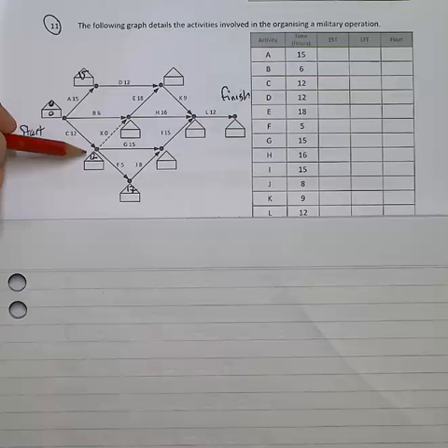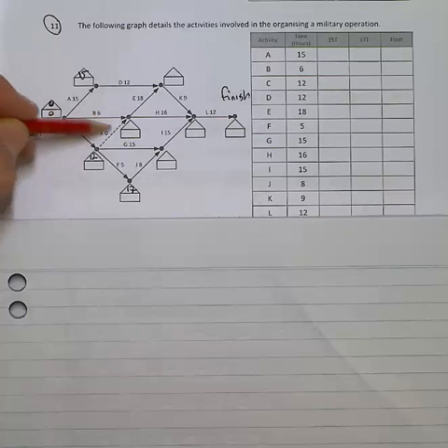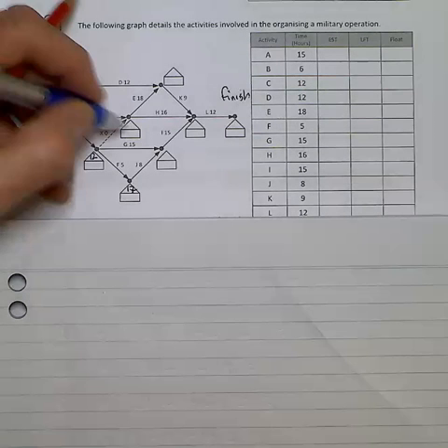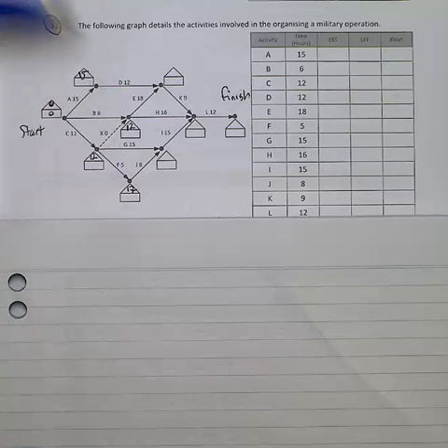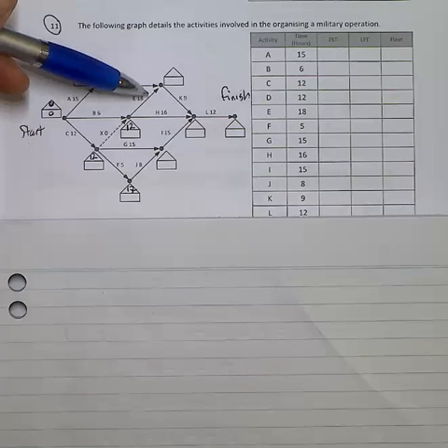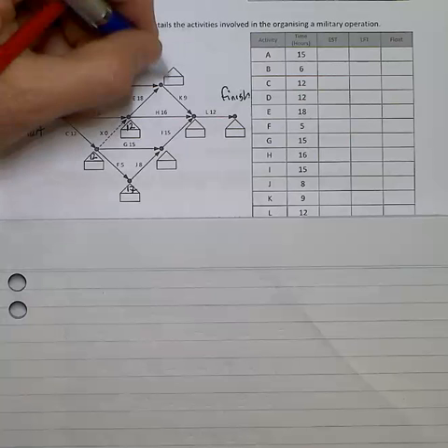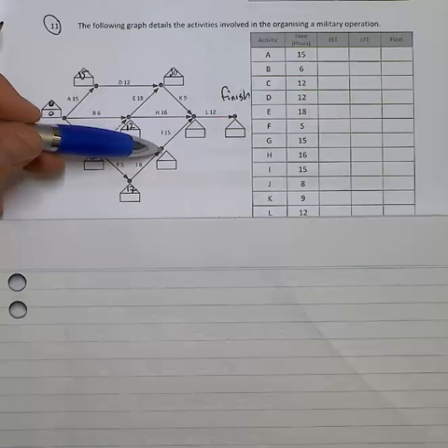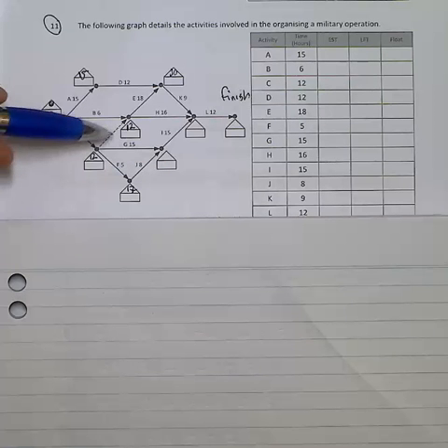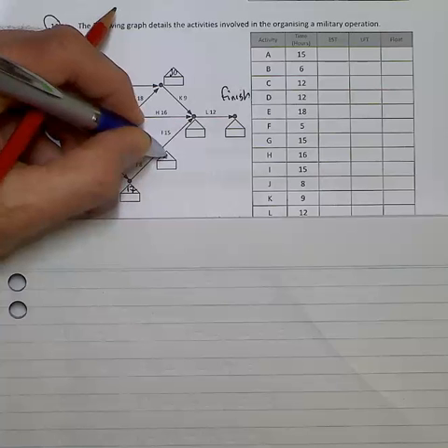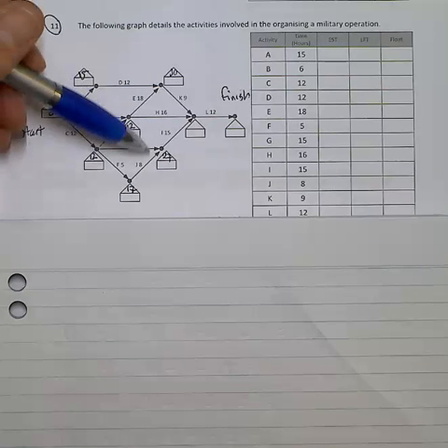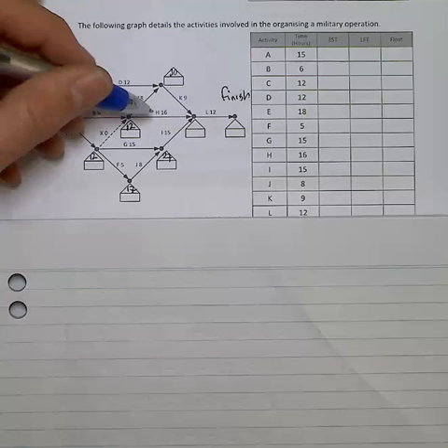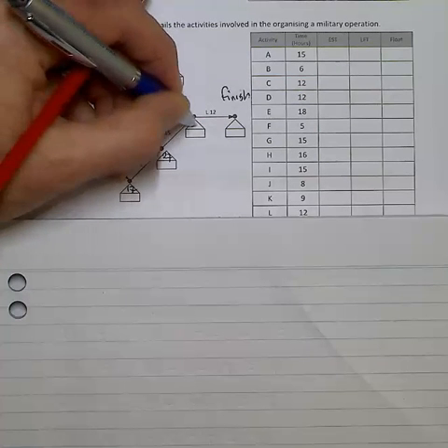Now please notice here we've got a dummy edge, and whilst that may not take any time, we've got to consider other contributing factors. So it looks like 12 is the only option in this instance. I've got 12 and 18, which is 30, or I've got 27, so I'll go 30 there. Now in this lower branch, I've got a choice of an addition of 13. I've got a choice of an addition of 15, which will give me 27. Moving on, well that can only be 32 or 28, 42 or 28 I should say, so 42, and that makes that 54.